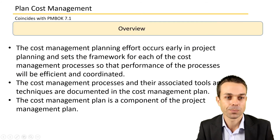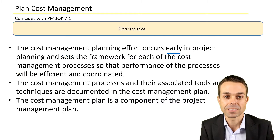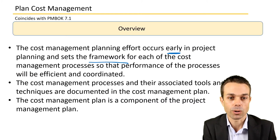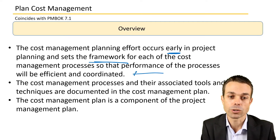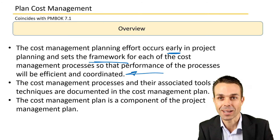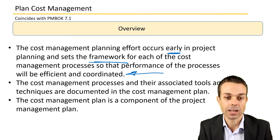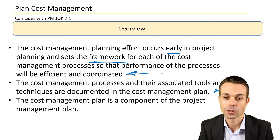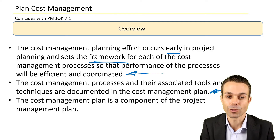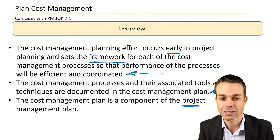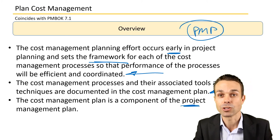The cost management planning effort occurs early in the project planning and sets the framework for each of the cost management processes, so that performance of those processes will be efficient and coordinated. The cost management processes and their associated tools and techniques are documented in this cost management plan. The cost management plan is a component of the overall project management plan, feeding back up into that larger document.